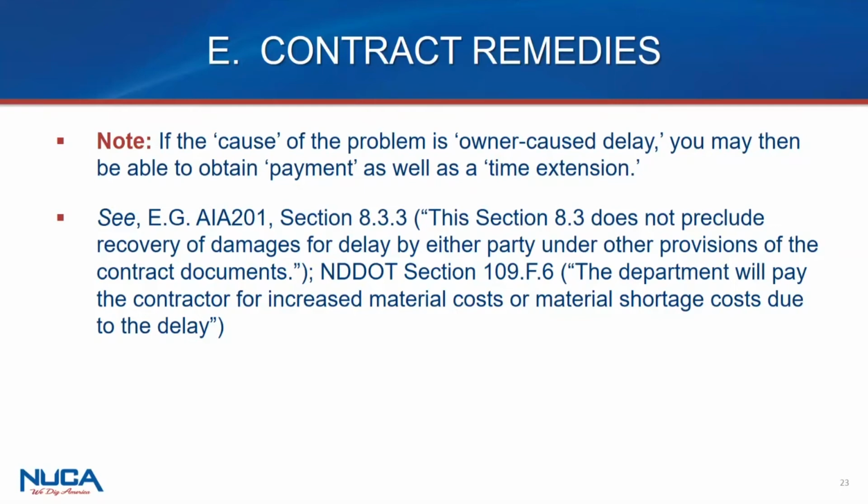Right. Just to go off course a second, I had a project with a late utility relocation. The contractor called me and asked, "Hey, do I have a right to get dollars for it?" I looked at the contract and said, "Nope, you just have a right to get time." We made the request for time. The county engineer denied the request. And then we gave notice as a follow-up: we're going to have to incur extra costs to meet the schedule that should be extended. The contractor ended up incurring, I think, 1.7 million to accelerate the project, and in arbitration we got about 1.4 of that.